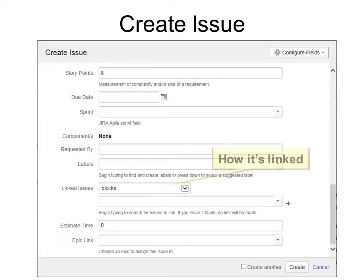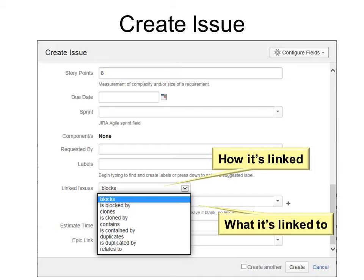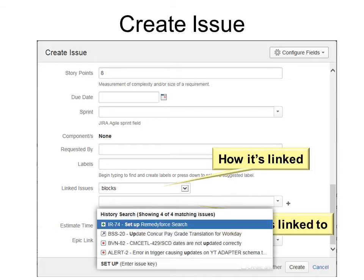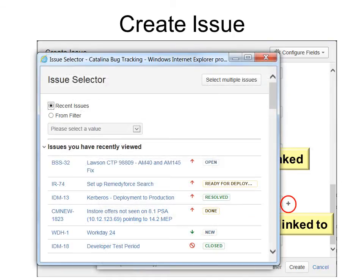The linked issues has first how it's linked to another issue. So is it blocks, is it blocked by, clones, cloned by, etc. And then it will show what it's linked to, what other issue it's linked to. I'll explain that in more detail in just a minute. Once you click the plus sign, then you'll see the different issues. You can see recent issues or if you have a filter saved, you can choose from that filter.